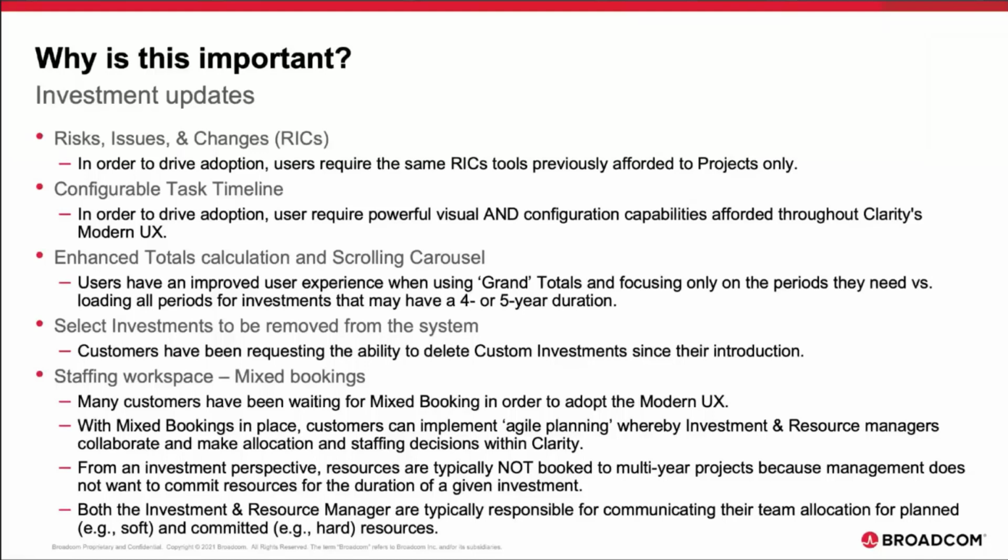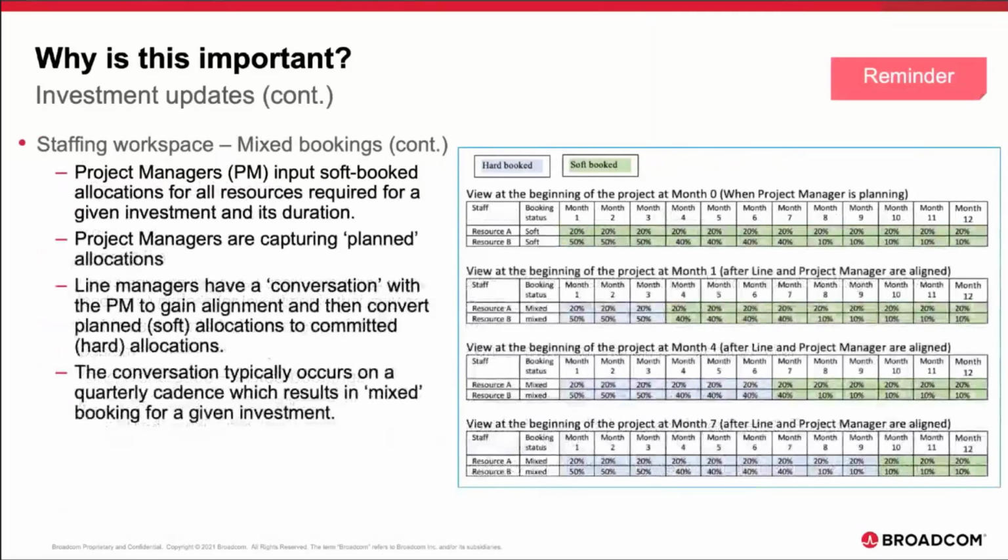And so from an investment perspective, resources are typically not booked to a multi-year project because management doesn't want to commit all those resources for the duration of an investment. So both the investment and resource manager are typically responsible for communicating their allocation for planned, a la soft, and committed or hard resources.